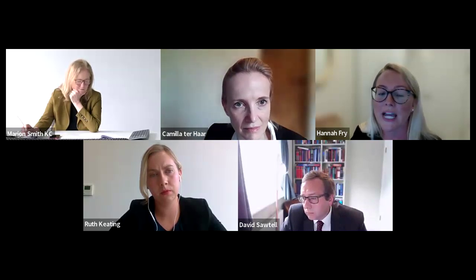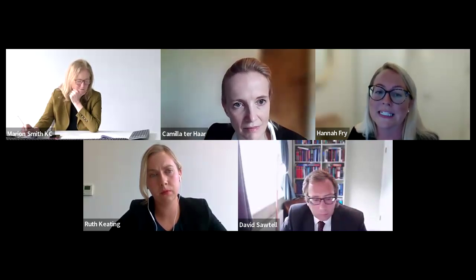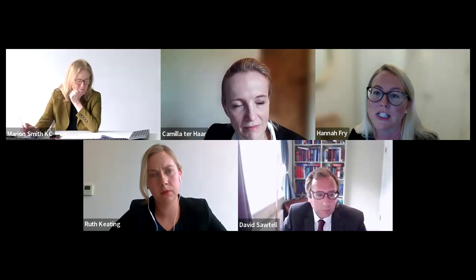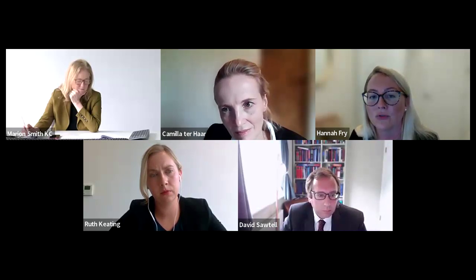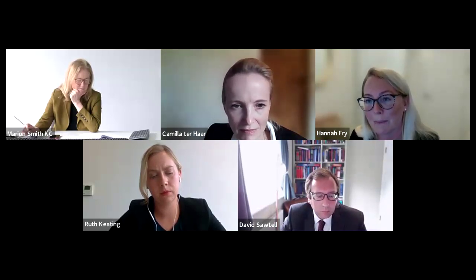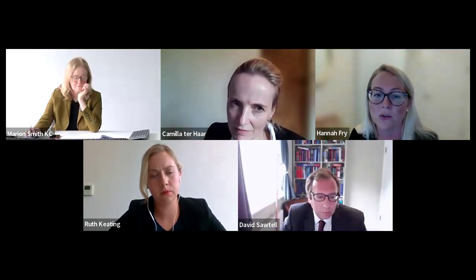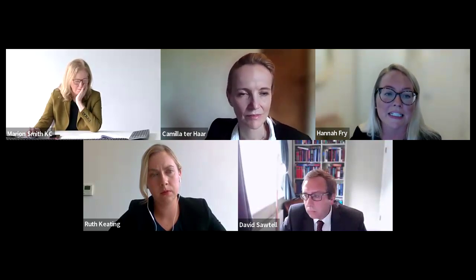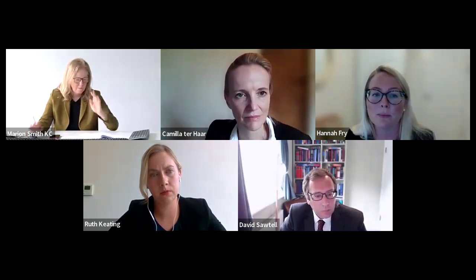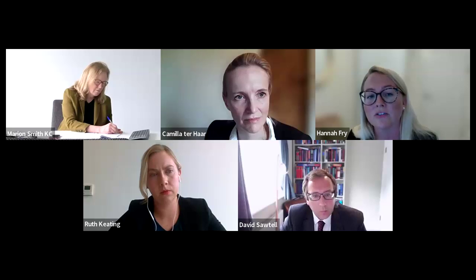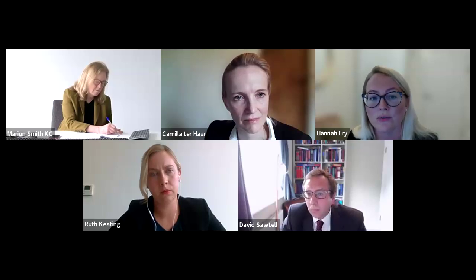So CIGA, which came into force on the 26th of June 2020, has introduced these 2 new restructuring and insolvency procedures that are designed to assist in rescuing financially distressed companies, particularly in light of COVID and the impact that we've seen on the construction sector. And as I say, these are the statutory moratorium process, which you can find in Part A1, and a restructuring plan procedure, which you can find in Part 26A.